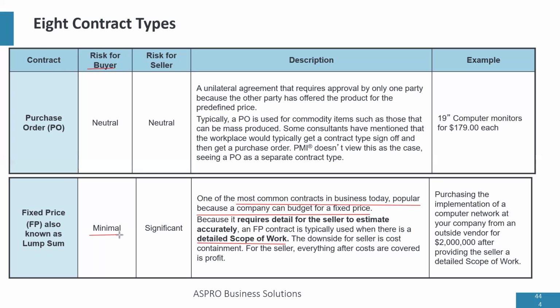They call the shots. If the seller accepts a fixed price contract and they don't do costing properly, sometimes there might be hidden cost. The seller can make a loss in this contract. Because if there are hidden costs, how do they make a loss? Because they've signed fixed price. Fixed price contract means that you can't go back to the client and say, I'm sorry, as some vendors do.